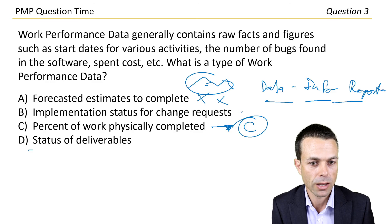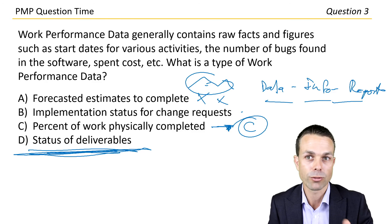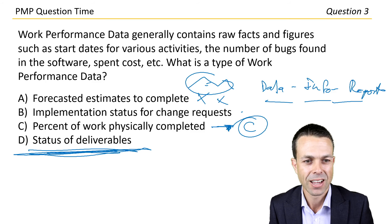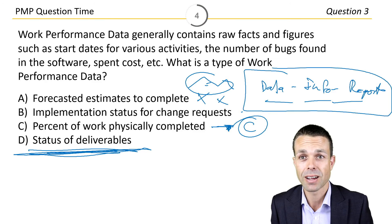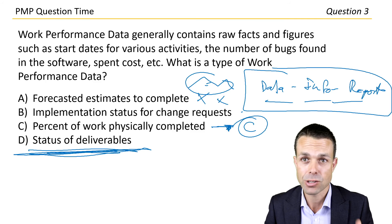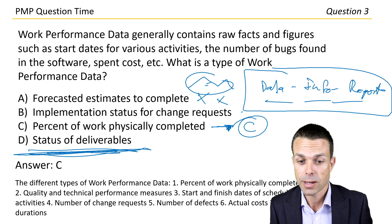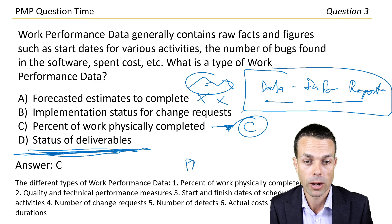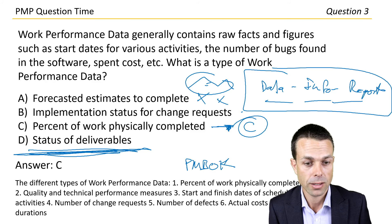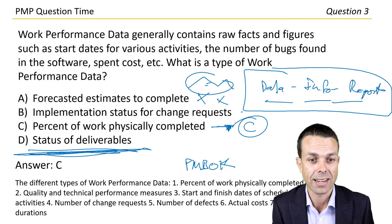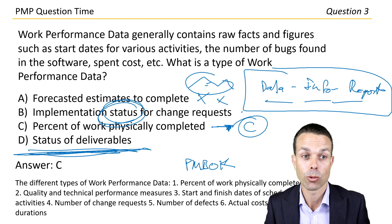Status of deliverables has to be measured against something else to create it, so probably not that. These are really tricky ones. For data, it's just the raw facts — how much have we completed. The PMBOK guide confirms: types of work performance data include percent of work physically completed, quality and technical performance measures, start and finish dates — pure facts — number of change requests (but not implementation status, as status is more about information), number of defects, actual costs, and actual durations. That was a bit tricky.